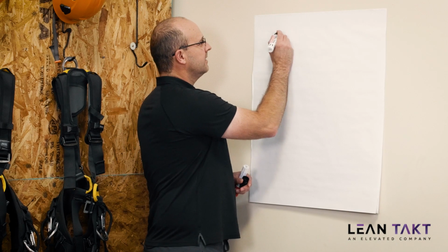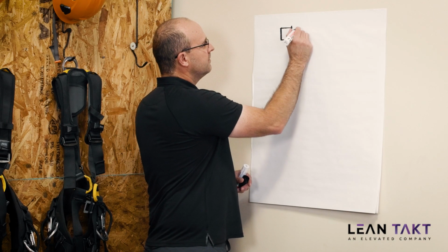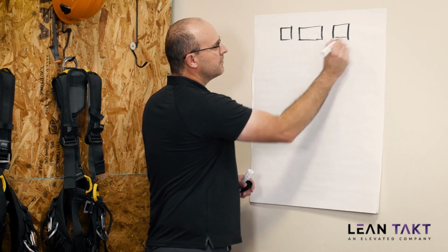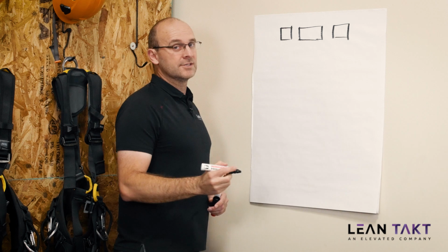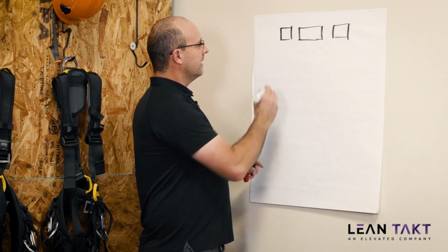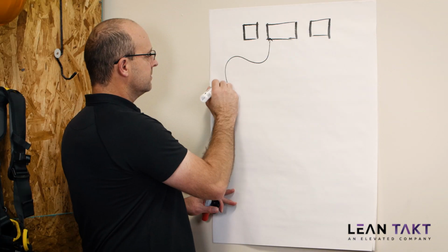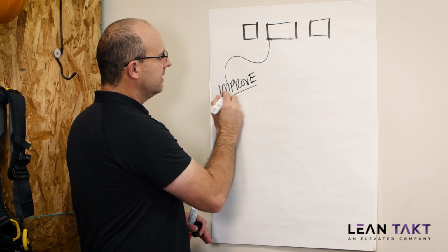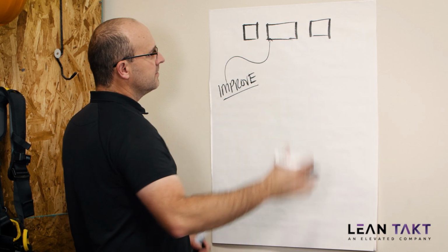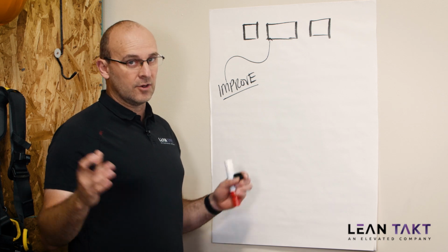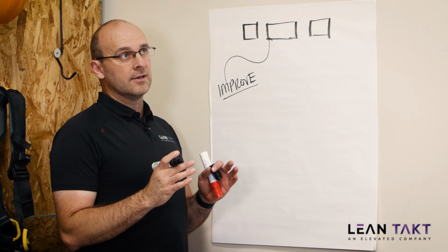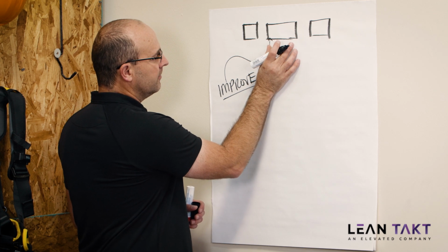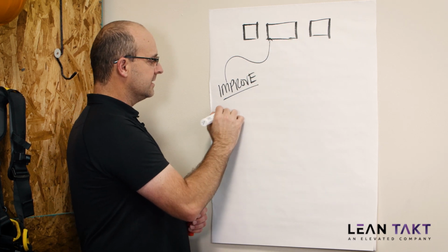If you had that scenario with those same trade partners, right, where this wagon was bigger, there's a couple things. Well, actually, there's probably a whole lot, but I'll just give you a couple. You can improve the work. So I'm just going to write improve. And what I mean by that is if the work is improved or the process is refined and the overall cycle time can reduce, then maybe that wagon can narrow a bit. The other thing that you can do is split it.